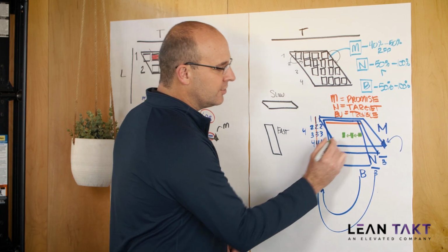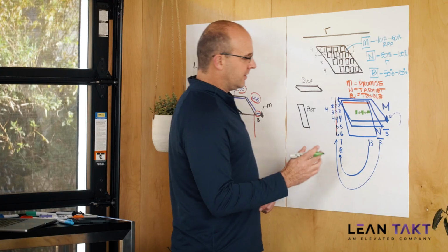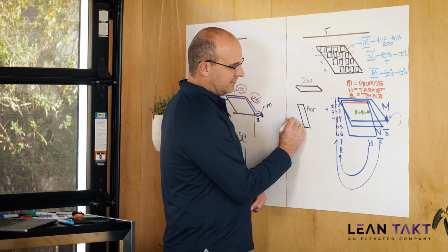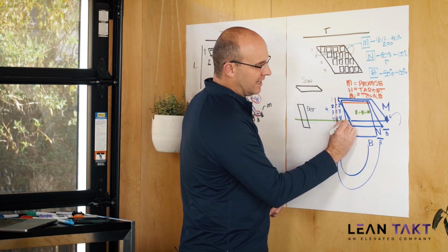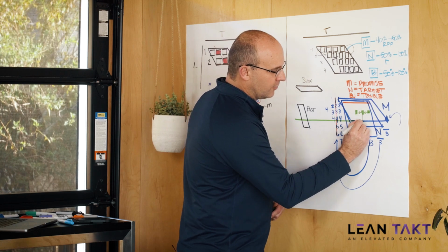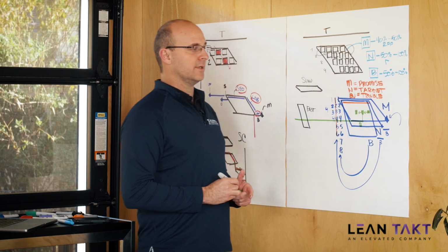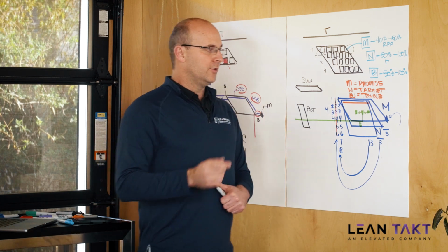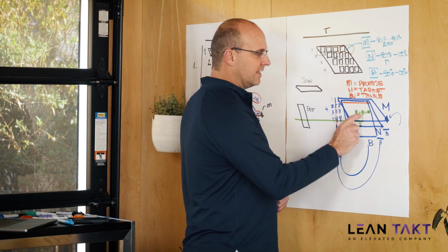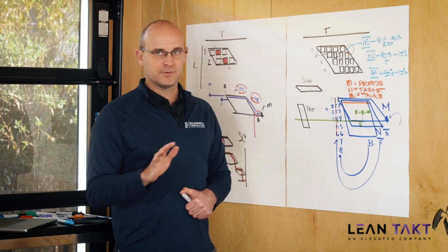So we do not target the supply chain to connect to the macro level date for the wagon. We target the norm and we add a buffer in the supply chain. So if you have a procurement log, which you should on every job, you need to target your norm level strategy. That's 100%.